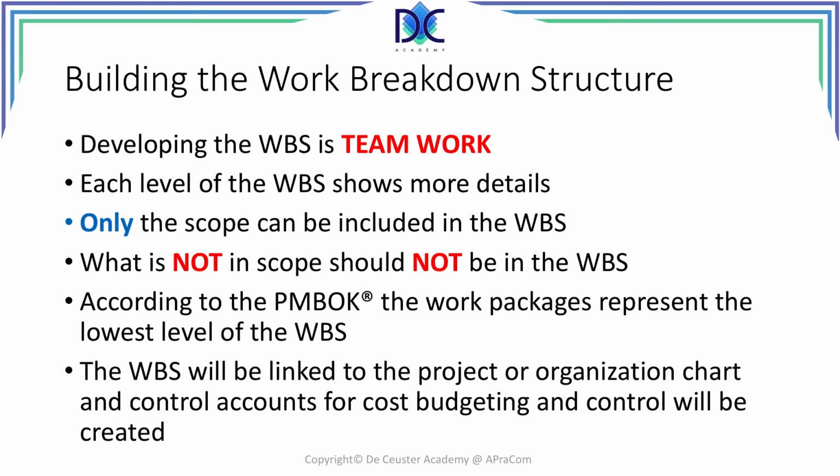When we build a WBS, it is done by the project team, or a limited team that we already have available at this part of the project. Like I said, each level of the WBS shows more detail, and we can only include the scope in the WBS.